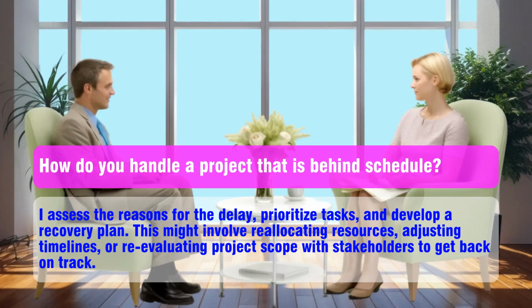How do you handle a project that is behind schedule? I assess the reasons for the delay, prioritize tasks, and develop a recovery plan. This might involve reallocating resources, adjusting timelines, or re-evaluating project scope with stakeholders to get back on track.